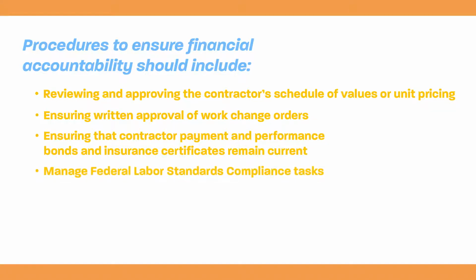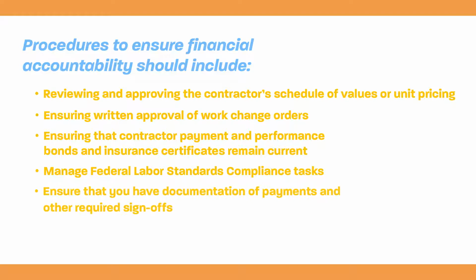Manage federal labor standards compliance tasks. Monitor for Davis-Bacon compliance, review certified payrolls, verify information through job site interviews, and ensure contractor compliance. Ensure that you have documentation of payments and other required sign-offs. Retain records and all applicable documentation in accordance with regulatory requirements.